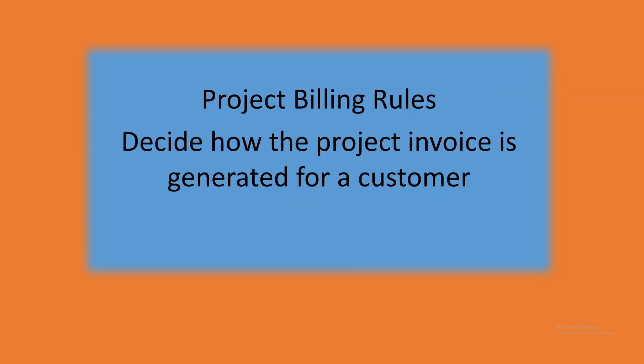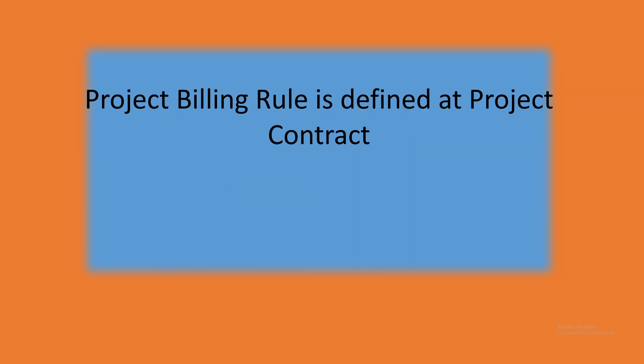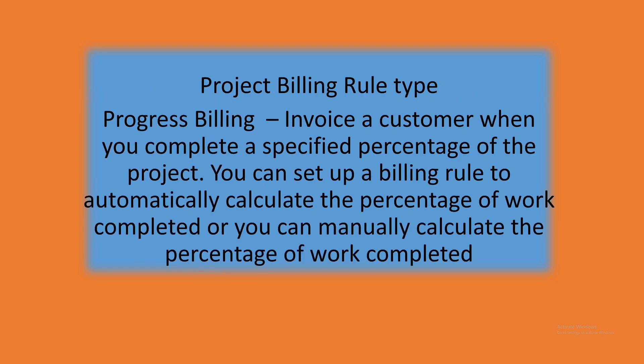Project billing rules define how we invoice the customer. The billing rule is defined at the project contract level. Progress billing is to invoice a customer when you complete a percentage of the project. You can set up billing rules to automatically calculate the percentage, or you can manually calculate the percentage of progress or work completed which has to be invoiced.